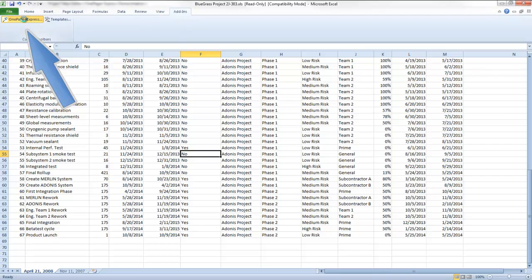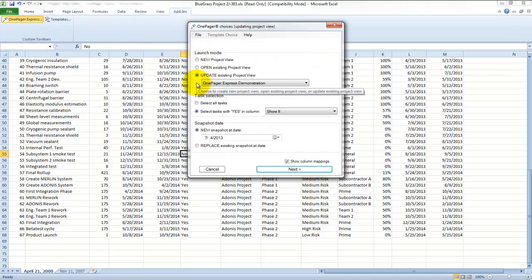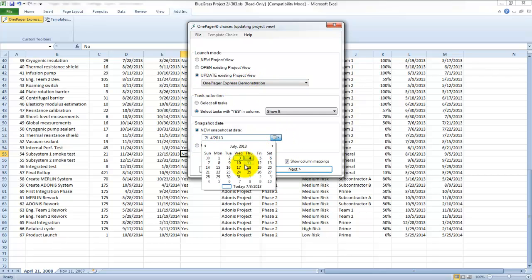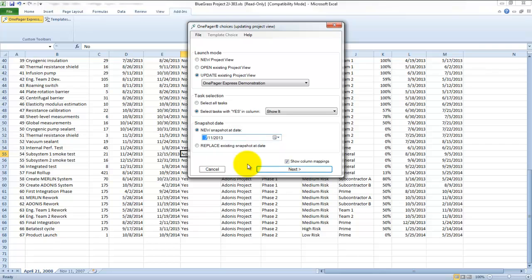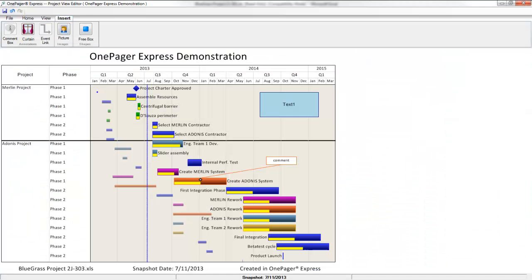Instead of making a new view, this time I'm going to update an existing project view and ask OnePager for a new snapshot. When I click the New button, OnePager will pull in my updates and present me with a new snapshot while maintaining all the customization I employed to the view.